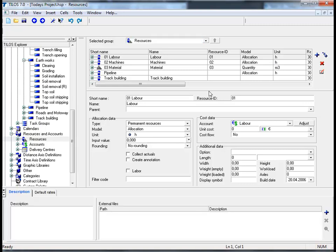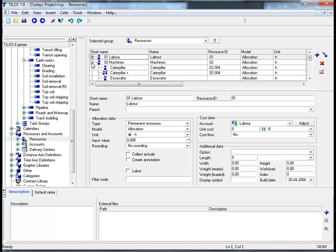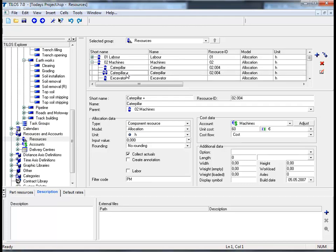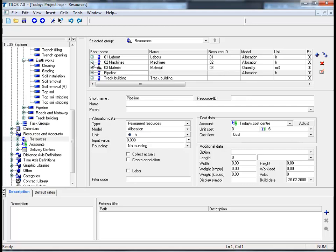Tylos is also capable of taking complex resources into consideration, a mixture of resources. If we click on the plus symbol next to machines we can see that we have a number of tasks which also include operators. Tylos takes equipment and an operator but also things like gasoline and diesel into consideration. All these resources that are stored here in a hierarchical manner have one specific thing in common.